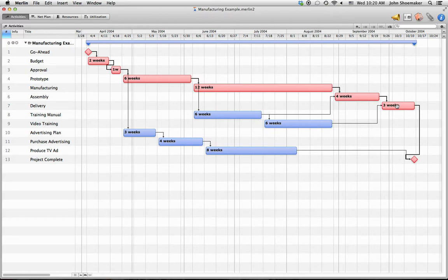You know, in my consulting work, I'm amazed at how many organizations manage a project without knowing where the critical path is. So as a project manager, these are the activities that I need to make sure finish on time because they're the ones that potentially will delay the completion of the project. Now that doesn't mean I ignore the others, but simply I have a little bit of leeway there because there's slack in case some of those activities would take a little bit longer than anticipated.